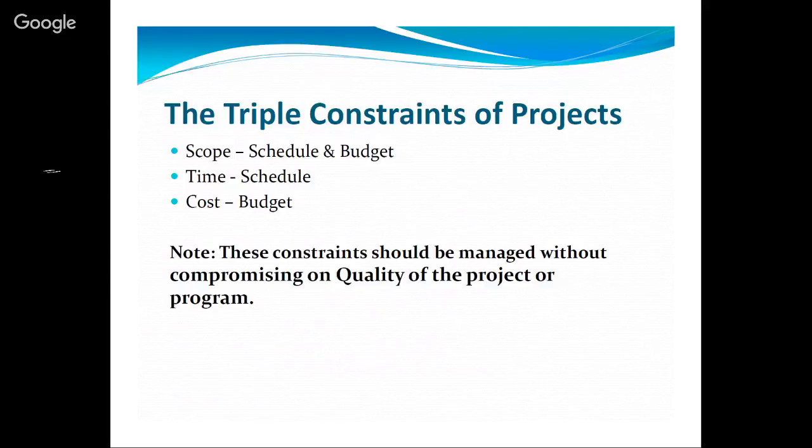In addition, when we actually schedule projects, there will be interdependencies. And these interdependencies will really determine the cost of the project. So if some of the dependencies are lagging behind, the question that comes in is, are we going to be crashing these projects? If we are going to crash the projects, that will mean cost. Then the other thing we should be asking ourselves is, can we do it within the approved budget? If that is not going to be done within the approved budget, we need to really bring all the stakeholders in and ask for new budgets for the incremental work or the crashing of the project to bring it back online for us to deliver on time and not jeopardize the quality of the project.